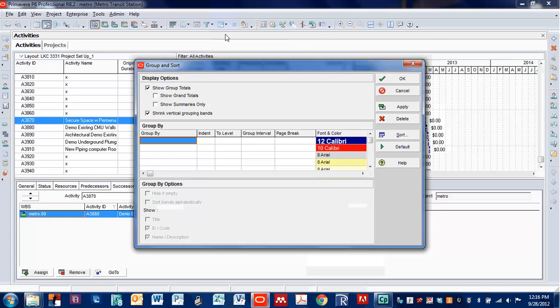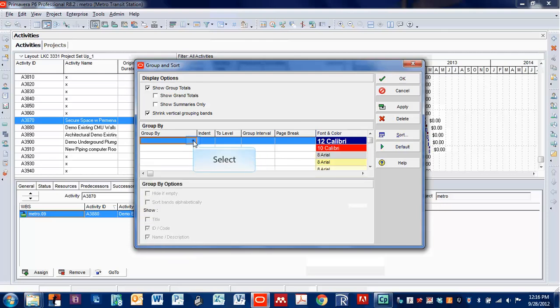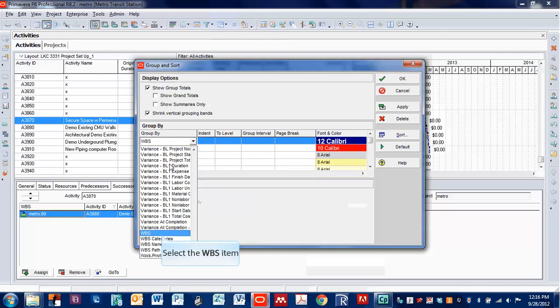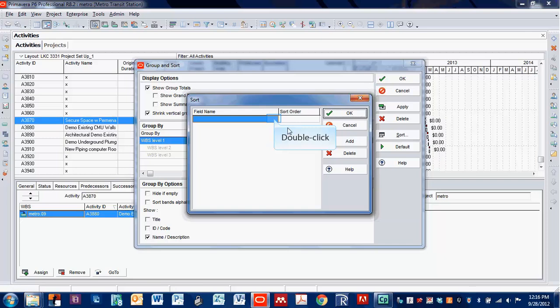Now we're like, okay, don't hyperventilate yet because we have not gotten back to our view. So all we have to do is come here, customize. Whenever you see this icon, see how it shows the sorting, the headers? Well, that's the way it typically, Primavera says that we're going to do this. So we're going to hit the group by, WBS. Oh, would help if I highlighted on it. We're going to go to level 3 because that's the only level we have.